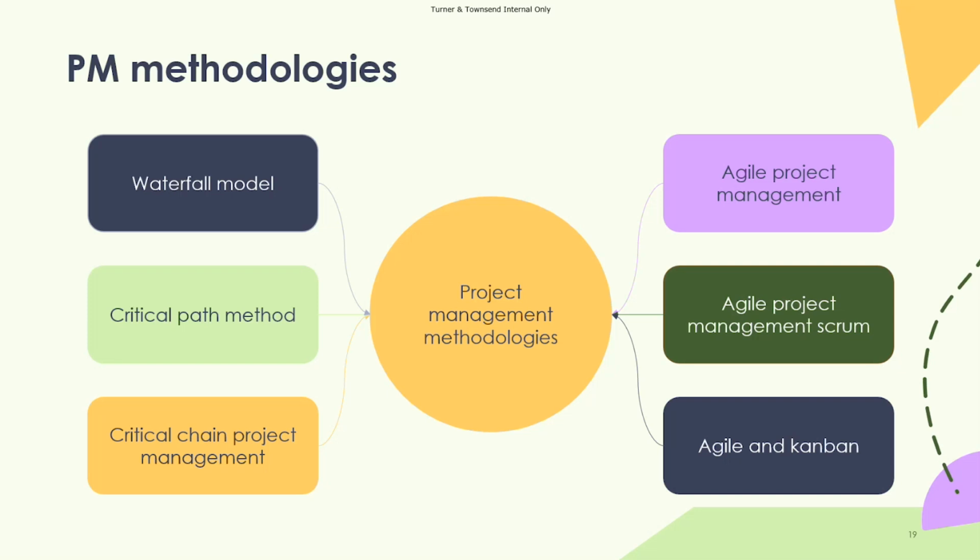So when developing project plans, there are different project management methodologies. So often built into how registered providers have managed projects over the years, there are lots of different solutions. And one of the ones that is most common is the waterfall methodology. The waterfall methodology is a traditional approach to project management. The tasks and phases are completed in a linear and sequential manner, and each of those stages must be completed before you can get on to the next stage. So you can understand what the dependencies are based on those different tasks.